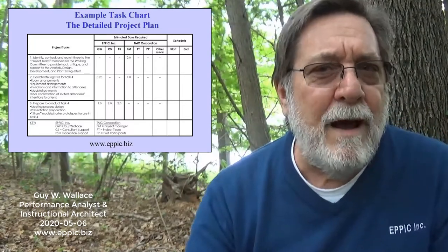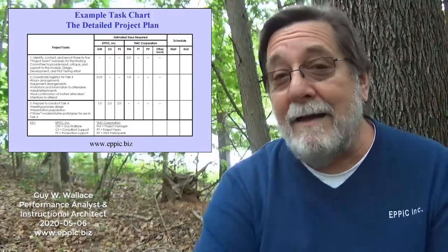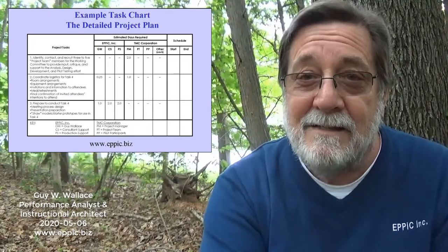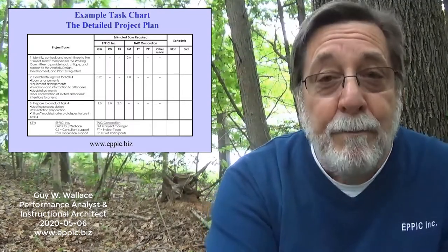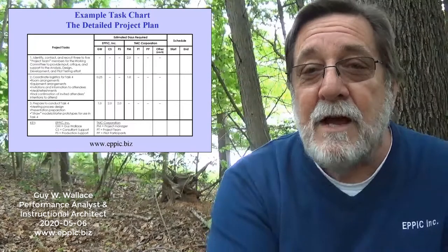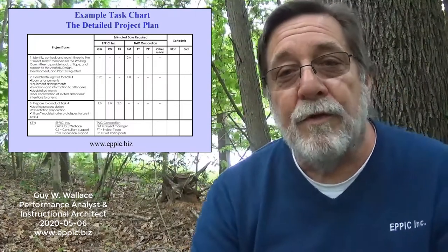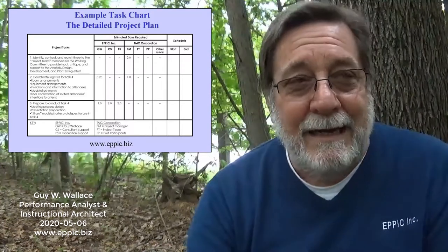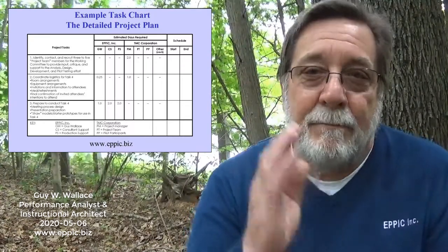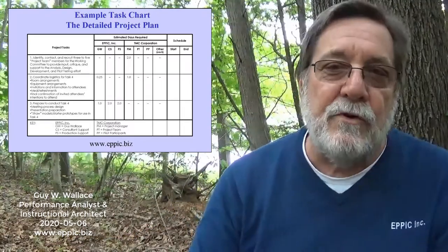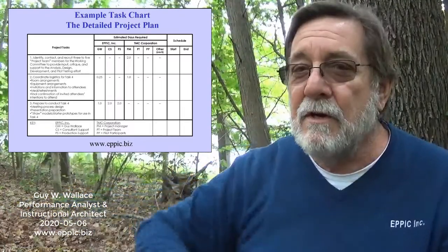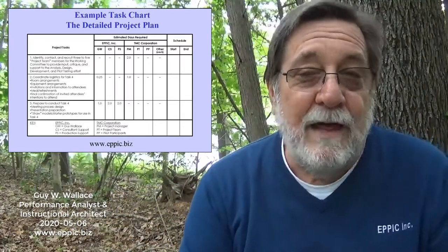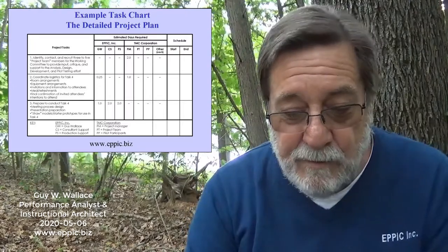And they might say, well, what about before that third Friday? I say, well, no, I can't deliver it before then because of the tasks that my team and your team are performing and the amount of cycle time I need to give people for the touch time that I've estimated. So I've got to give a little wiggle room in the timing of everything. Not everything is back to back to back, because if one thing goes wrong here, then the rest of the schedule is toast from there on out. You want to be able to recover. That would be my rationale to the clients when we were explaining all this.